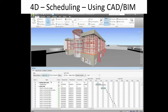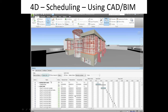Another very popular tool today is 4D scheduling. You can use either CAD or BIM, and most leading industries have shifted to BIM for this use. What 4D does is integrate the 3D of CAD or building information models with your regular schedule. For example, if I was going to install a window at a certain time, my activity for that window would be linked to the graphic of the window, and when it comes time to install that window, the window graphic will appear in the model. That is why it is called 4D scheduling — it is an integrated model.